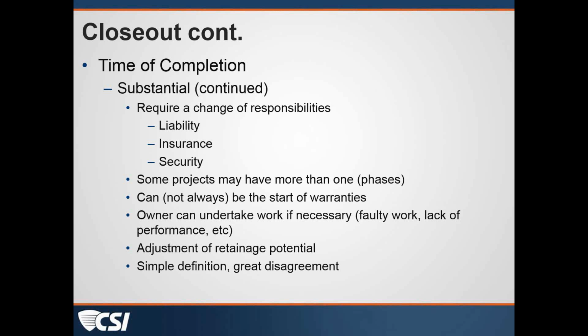The local authority having jurisdiction might well find that this facility meets specific code requirements enough to say, yes, you can move in. But it may not be practical or possible for the owner to use the facility for the purpose it was intended without some other things that the inspector really has no concern over.